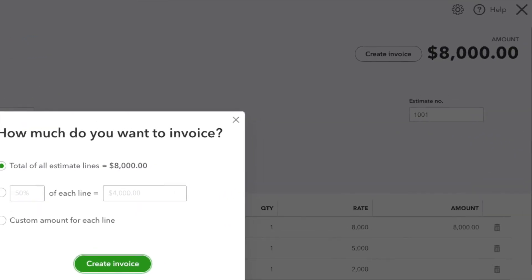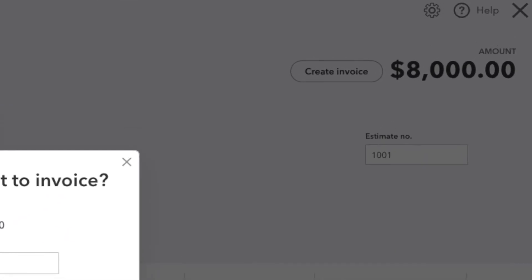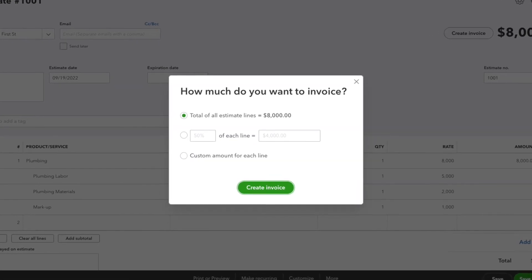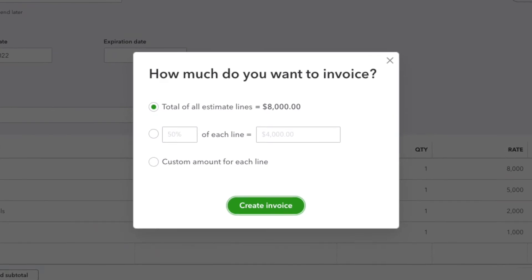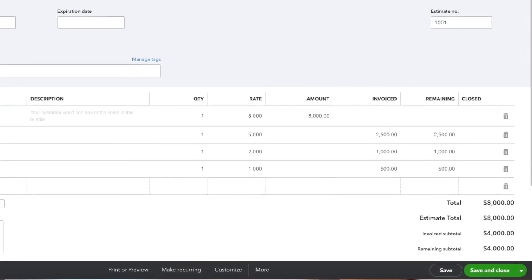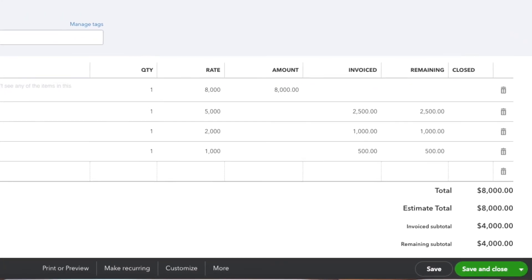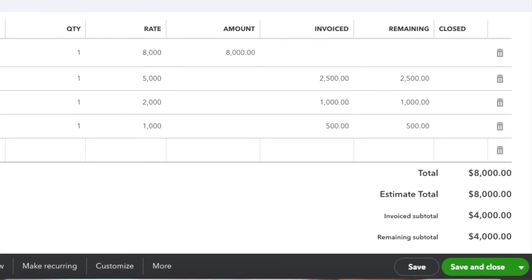Another thing you can easily do in QuickBooks Online is progress invoicing. Create your estimate, then in the top right corner click 'Create Invoice.' It gives you different options: full amount, half amount, or a percentage. When you send that invoice and go back to the estimate, it will show you how much has been estimated, how much has been invoiced, and what the remaining balance is.